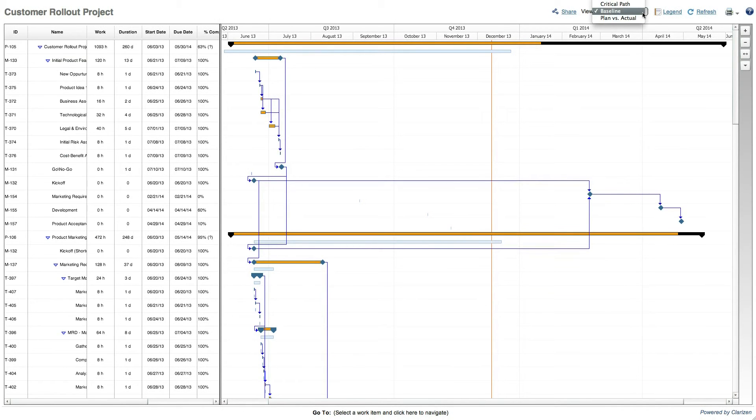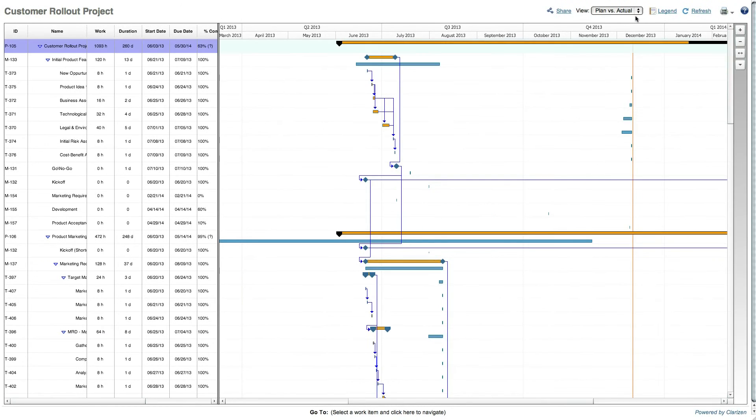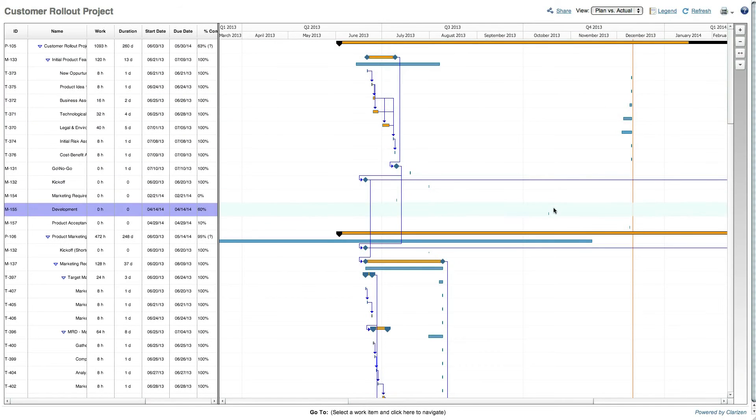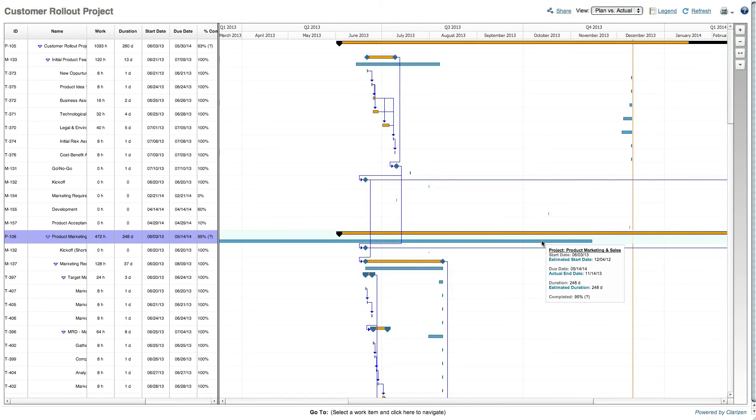Lastly, the plan versus actual view, which like the baseline view, displays multiple bars to show the actual progress of started and completed work items. In this view, the first bar displays the up-to-date plan and the second bar stretches from the actual start date or estimated start date to the actual end date or estimated end date.